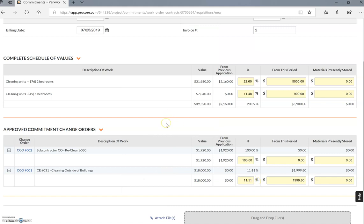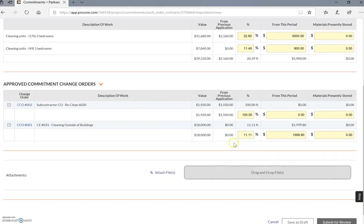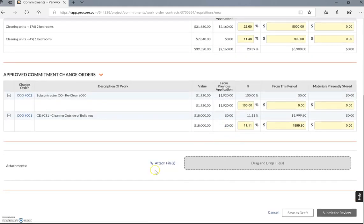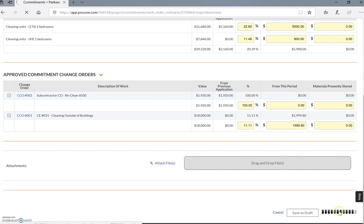You go in here and you put 11.11% because that's as far as you're done, and we're going to submit for review. I'm going to put this on hold for a second.